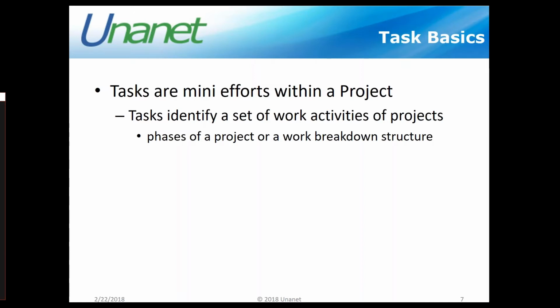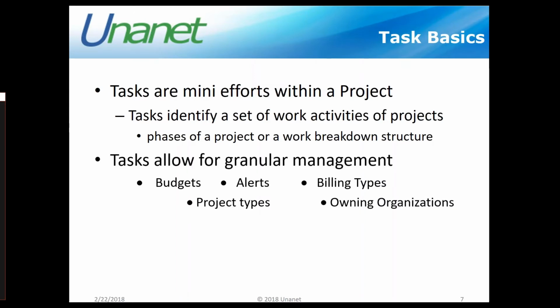What's nice about tasks is that tasks allow for this granular management. If you want to manage individual budgets for your tasks, set them up as tasks, and we're going to show you how to choose the box for manage at task level, and then you can put your budgets at the task level and then manage them there. You can set alerts up at your task level. We also have alerts at your project level, but we can set them up at your task level and inherit that information.